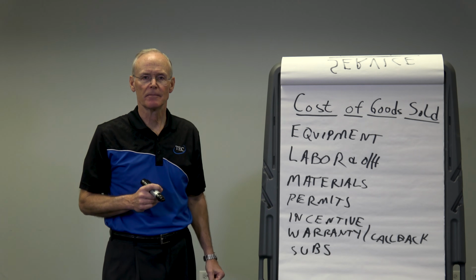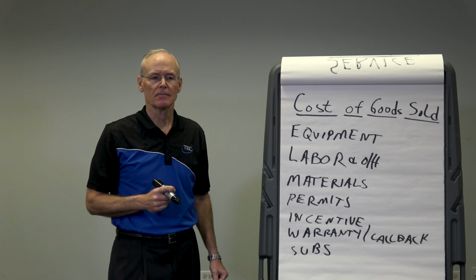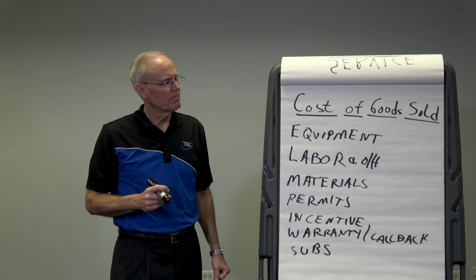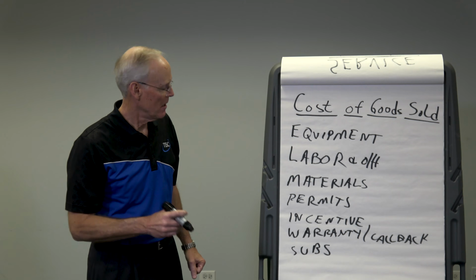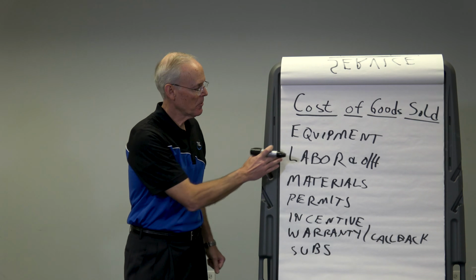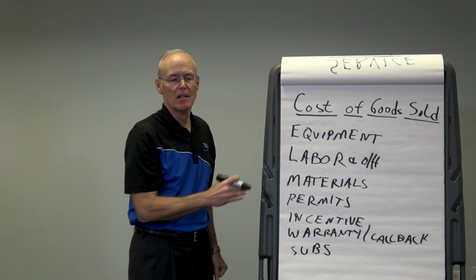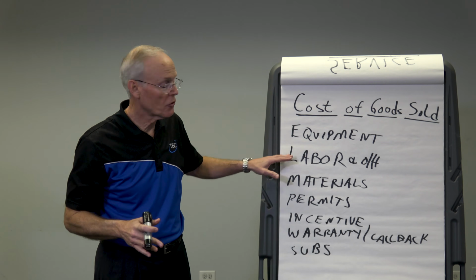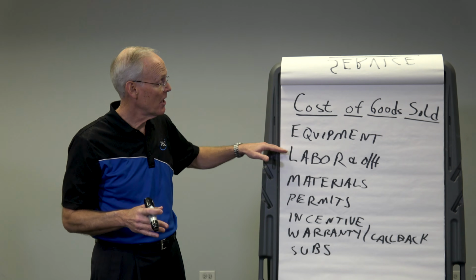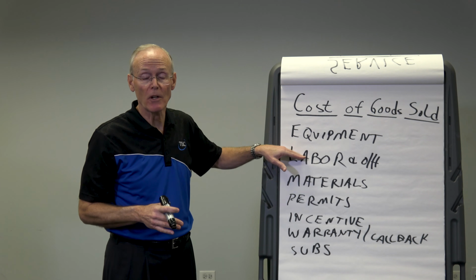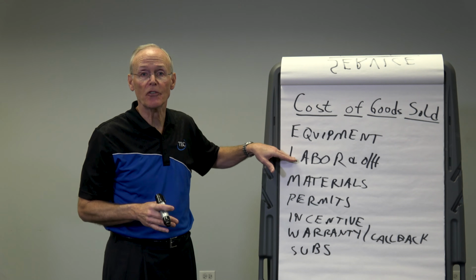Anything else? Any other people? Like if I have a project manager on a commercial job, or my dispatcher, secretary, any of those things? No, I would put that under overhead. You remember, only because you got the job. If you as an owner go out and put those things in, that's what happens in a lot of small businesses. You put in there what your hourly time is, and those go into cost of sales.